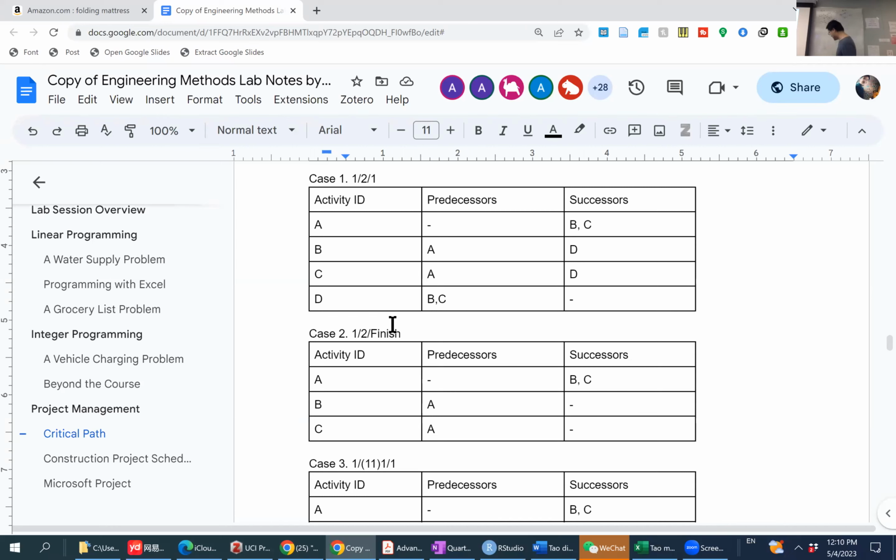In the other case, you could also possibly draw the other way, identifying the node below as the finishing point. So if I identify this one as the finishing point, then we just draw an arrow this way. So in this case, we do need a dashed line because there's no activity happening here. We do not have another activity. So that's why we need a dashed arrow.